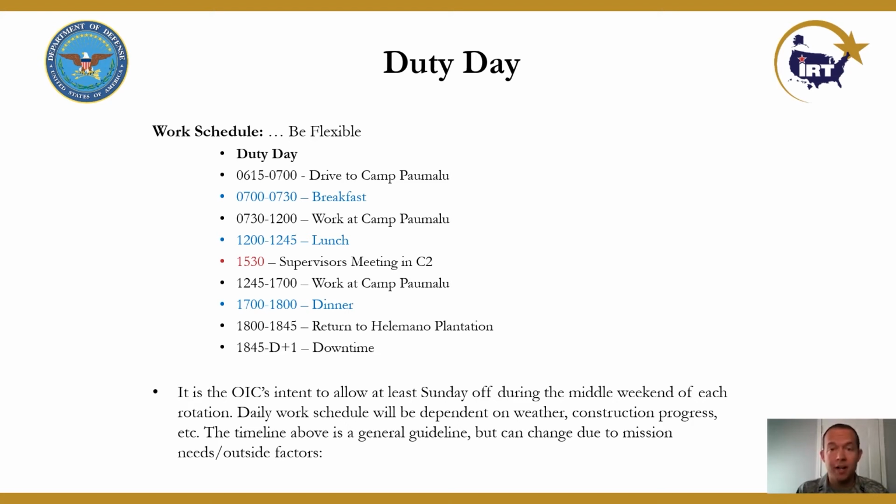Well, we're going to be behind and you're not going to be able to give everyone Saturday and Sunday off. You don't want to have to take away a down day. You want to be able to give additional down days, but you sure don't want to have to take them away. So at a minimum, setting expectations, promise that middle Sunday off, and that's it. Anything else will depend on weather, construction progress, etc.